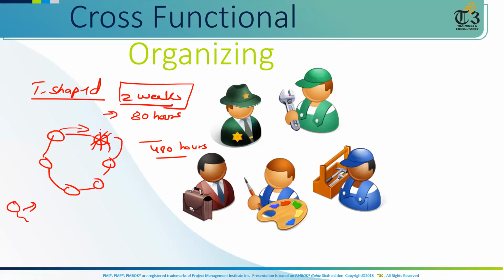Because in the middle of the sprint, we usually cannot add team members in Agile. Every Agile approach has a different thing, but the normal perception is we cannot add a team member in the middle. If we want to add one, it has to be done before starting the sprint or iteration with the help of the functional manager or PM. So no one can be added in the middle of the sprint. No human can be added. No work can be added. No change can be introduced at that time.